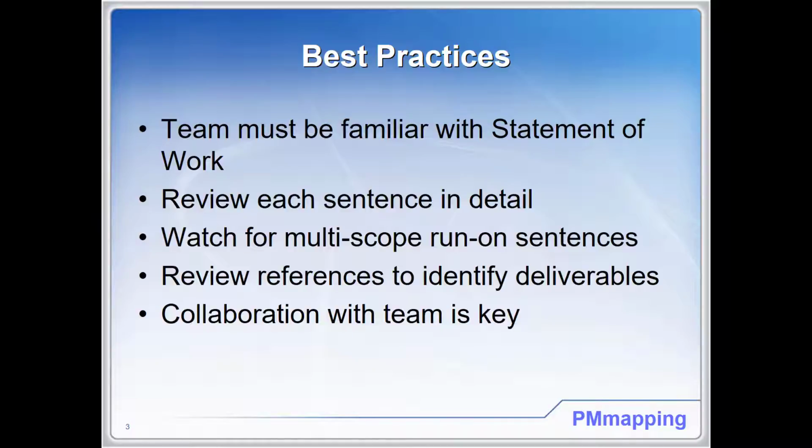Remember also the statement of work is going to have a combination of deliverables and requirements. References, make certain that you evaluate each reference in detail, understanding the requirements, and then also understanding if you need to add deliverables to the WBS. Collaboration is key. It's a team effort. Get your team involved. That way you're able to get buy-in on the project once you start project execution.